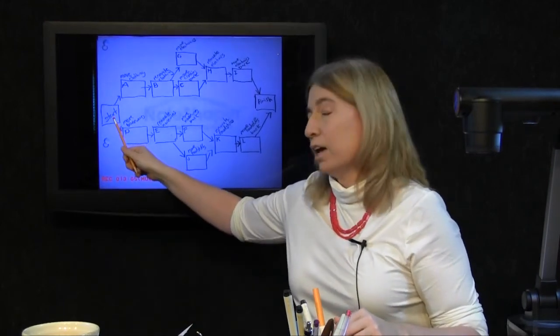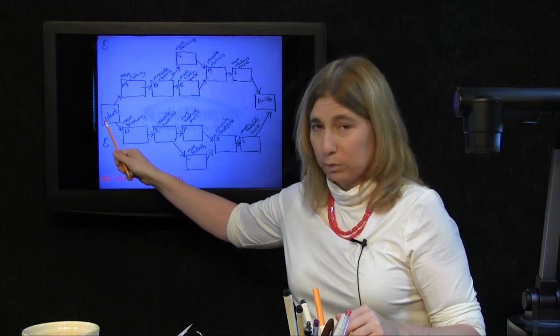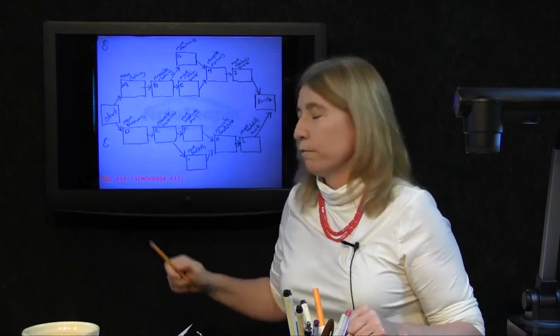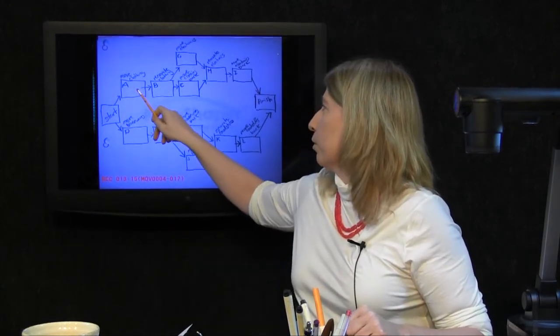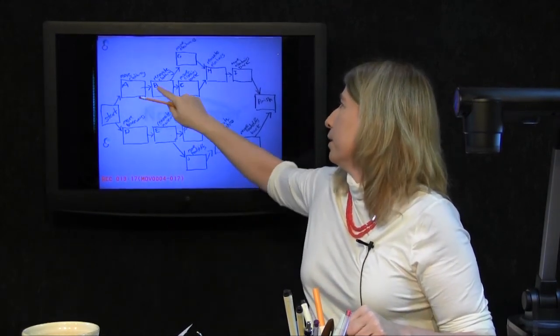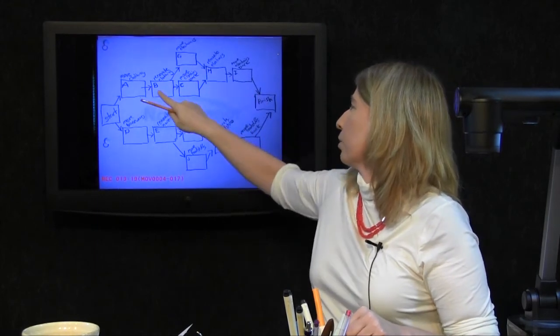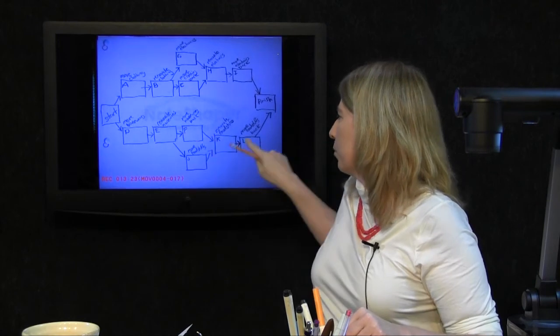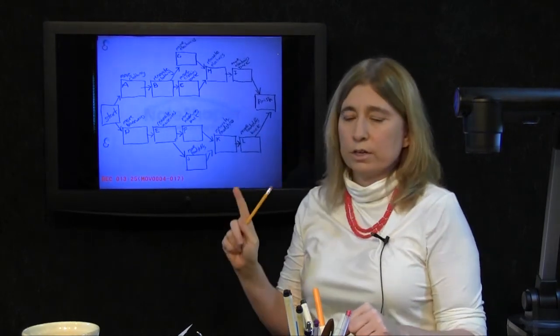A path is any logical, complete route from start to finish. In this particular network, I see 4 of them. From start, you could go up to A, and from A to B, and then you could go G, H, I or C, H, I. That's 2 paths here, and then see how we have a similar pattern of 2 paths here?